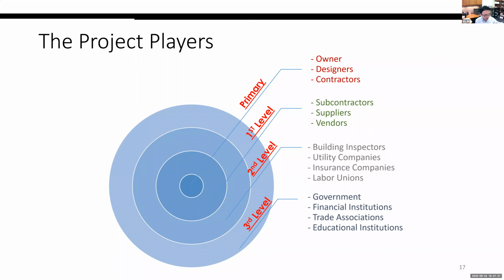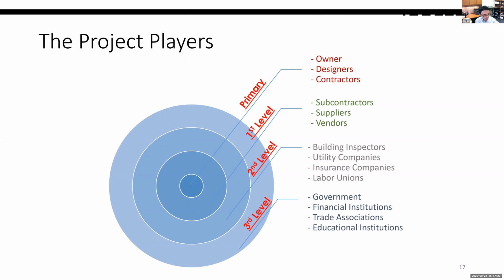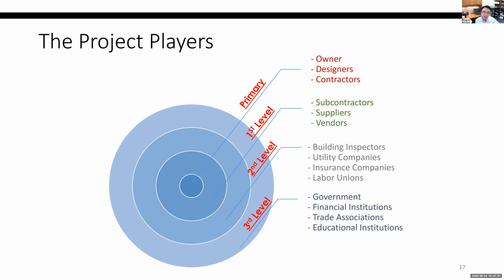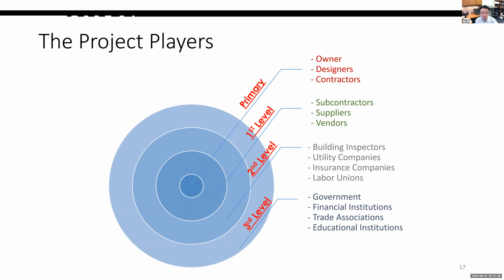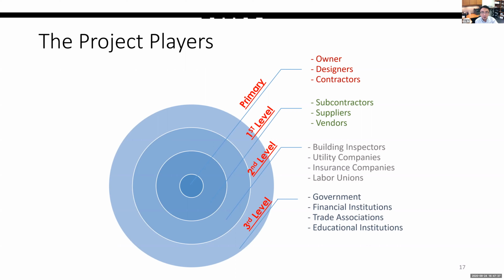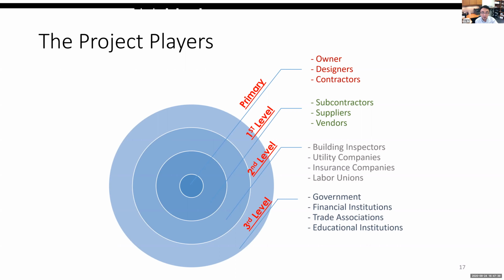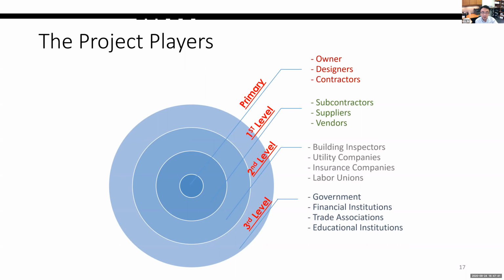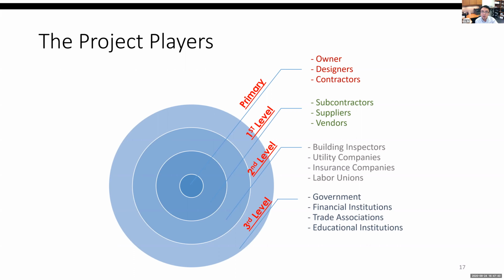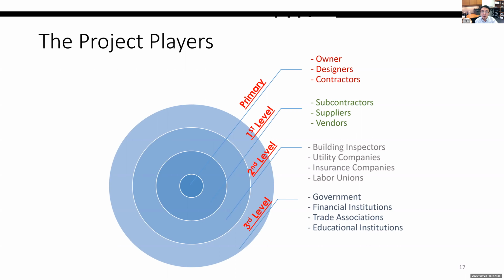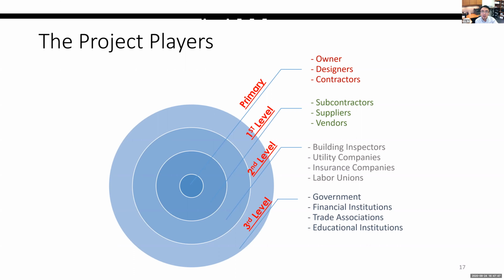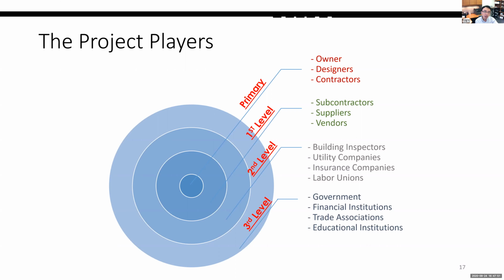And we have suppliers, right? So if you want to buy things from suppliers, you have to consider their impacts on your project, such as their lead time for delivery. I was working for Zachary. I think I said that. And Zachary is building a lot of power plants. So there are only a couple of countries in the world that can produce the turbines and generators.